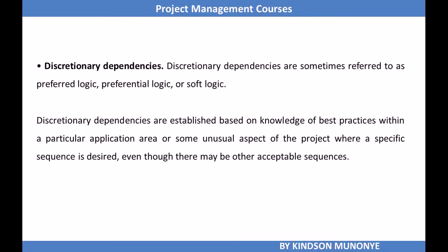Then we have discretionary dependencies, also called preferred logic, soft logic, or preferential logic. They are established based on knowledge of best practices within a particular application area, or some unusual aspect of the project where a specific sequence is desired, even though there may be other acceptable sequences.